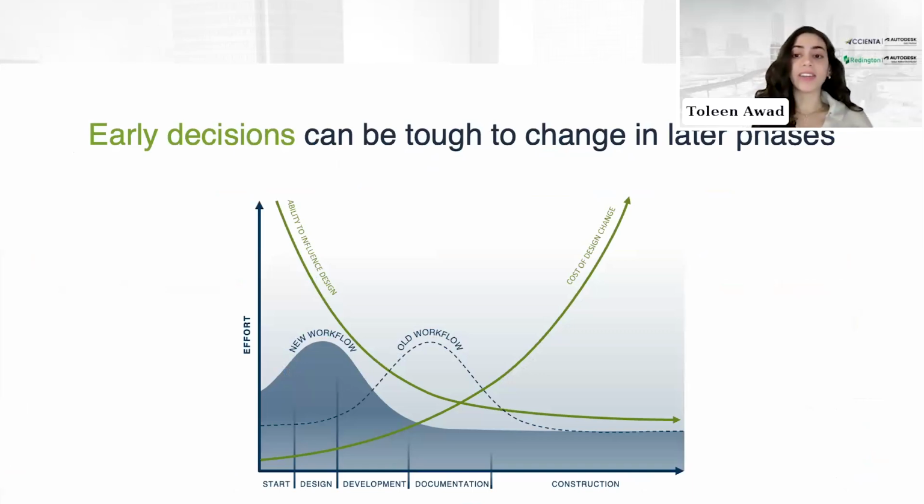Now, the stakes of these early stage decisions are very high, with lasting impact throughout the project lifecycle. According to Scansa, more than 50% of residential project value can be realized in the early stage design phase. So key project decisions made at this point, such as massing and layout, have lasting consequences. As the design progresses into later phases of the project, those fundamental design choices become hard or even impossible to change with current tools, which are usually optimized for a specific project phase. Next, please.